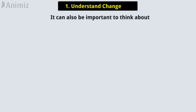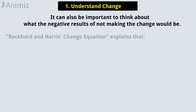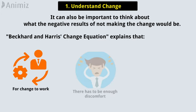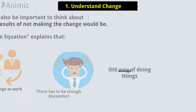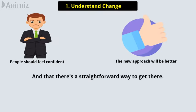It can also be important to think about what the negative results of not making the change would be. The Beckett and Harris change equation explains that for change to work, there has to be enough discomfort with the old way of doing things. People should feel confident that the new approach will be better, and that there's a straightforward way to get there.